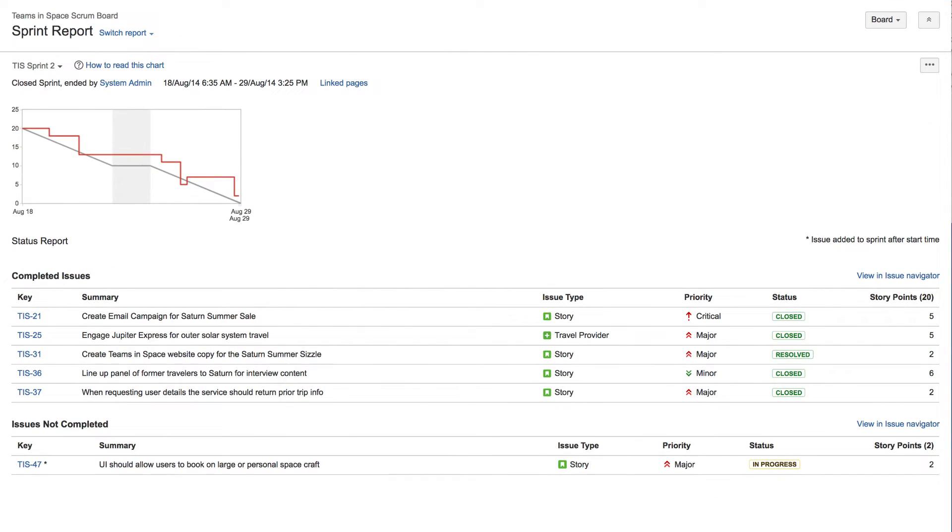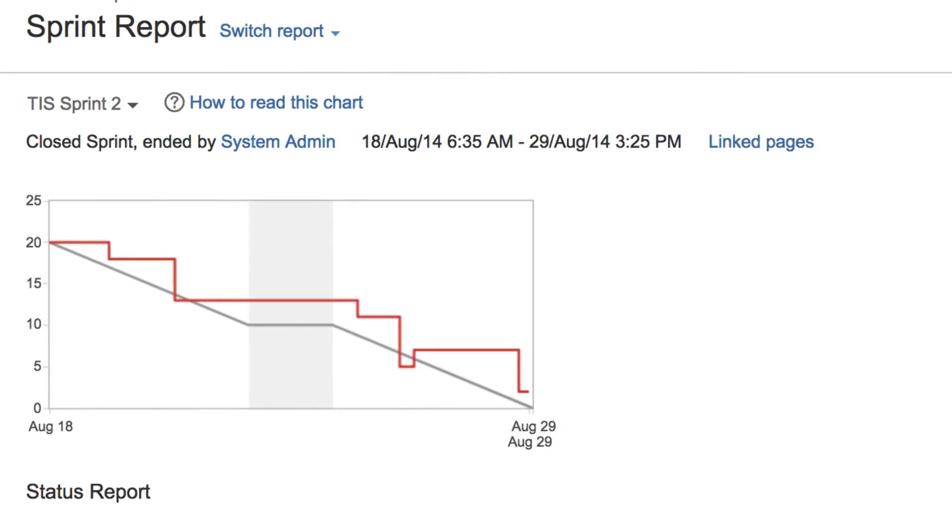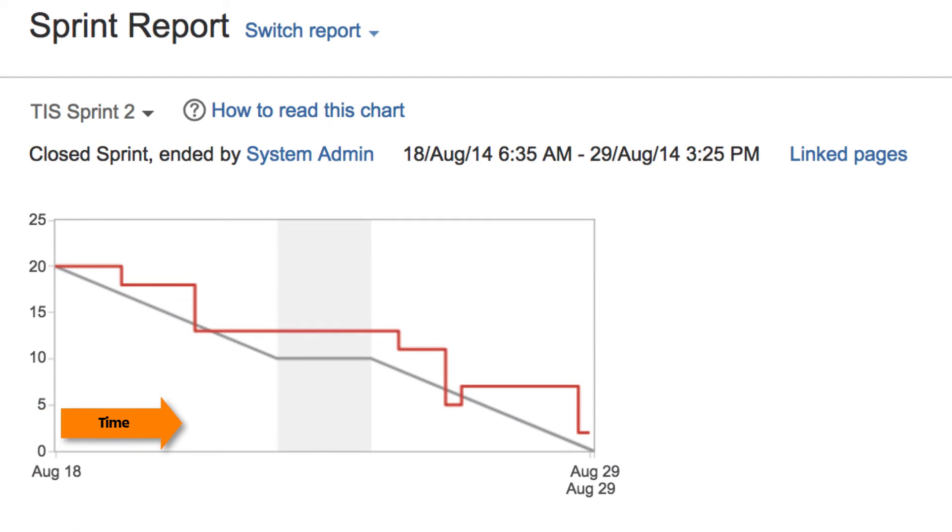In the Sprint Report's condensed burndown chart, the horizontal axis represents time, and the vertical axis represents the number of issues in the Sprint.